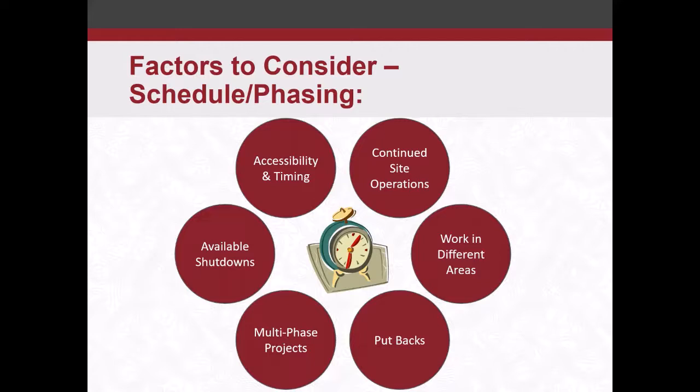You might see that also on exterior facades with windows. Rather than trying to board a window system up after you abate it, you might just abate it, move your work area, and have someone else come in and do the window replacement right after them, so you don't have that opening.